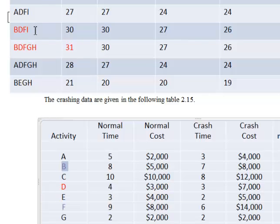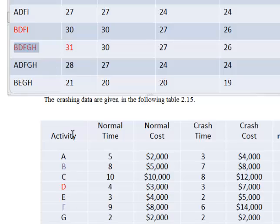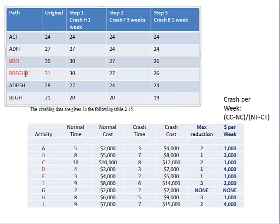Now what's left? In path BDFGH: B is done, D is eliminated, F is done, G cannot be crashed, and H is done. In path BDFI: you could crash I, but you cannot crash I by itself because there is another critical path, BDFGH, that would also need to be crashed simultaneously. Since there is no compatible partner activity, you are complete — that's it.